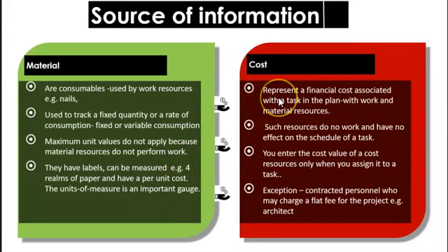With respect to costs, it represents a financial cost associated with a task in the plan. Such resources do no work and have no effect on the schedule of a task. You enter the cost value of a cost resource only when you assign it to a task.